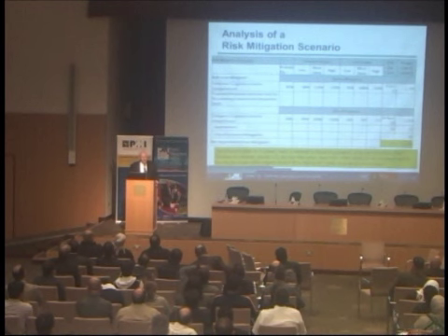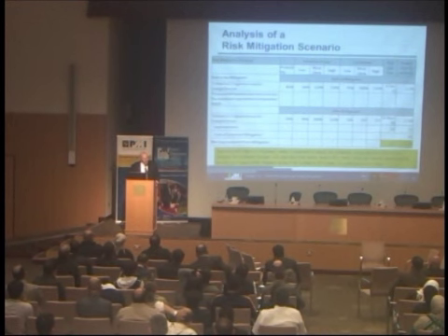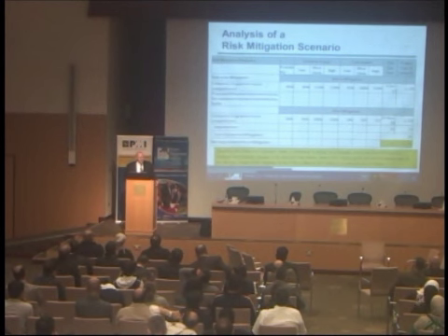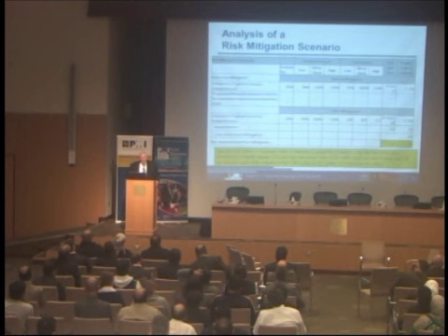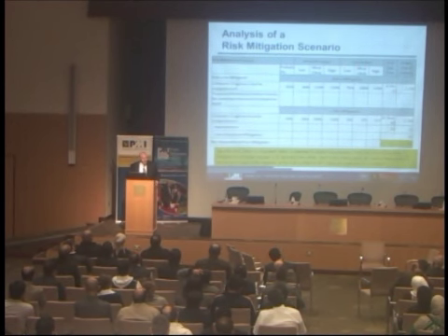This is where the team and the project manager get together and figure out what to do about the risks in priority order. By the way, not all the risks will contribute to the schedule or cost risk. Some of them, for instance, will be on risk slack paths where maybe the risk is serious, but the path is never driving the result. So you may have 20 or 30 risks, but only 10 or 15 of them actually show up in the table.